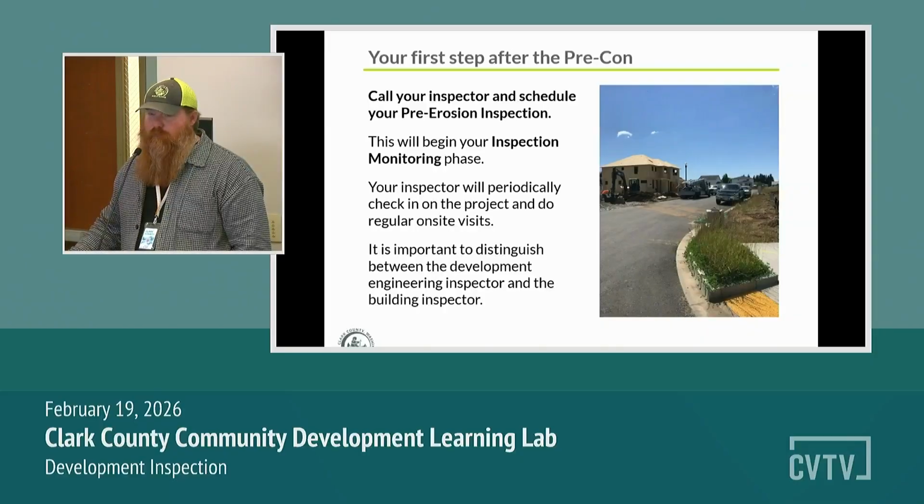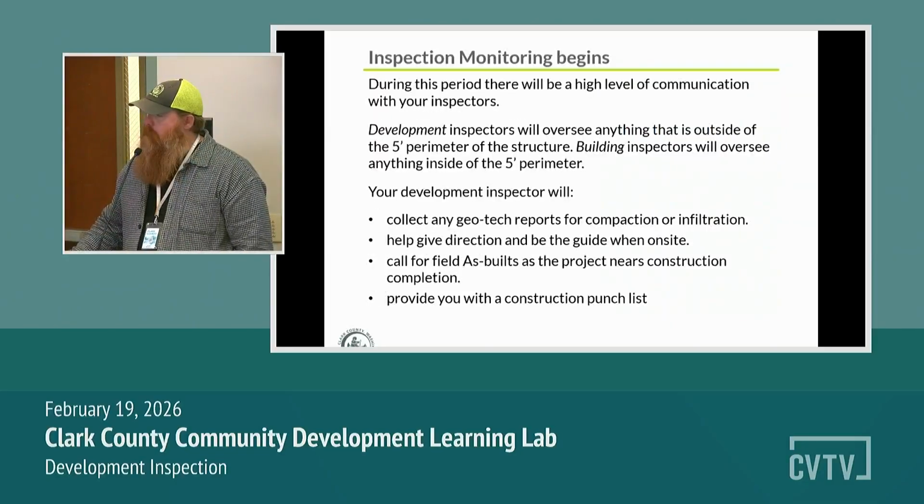It's also important to distinguish the difference between your site inspector, or your development engineering inspector, and the building inspector. Development inspectors will oversee anything that is outside of the 5-foot perimeter of the structure, and building inspectors will oversee anything that is inside of the 5-foot perimeter.